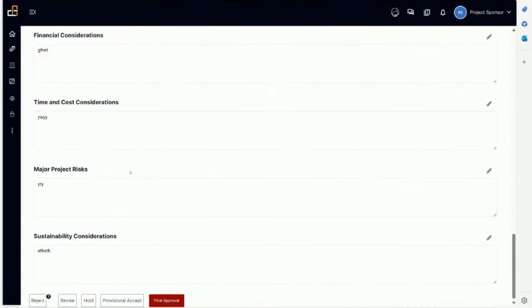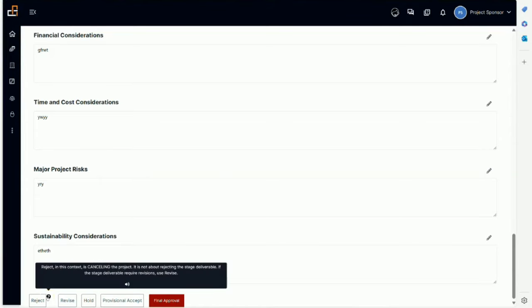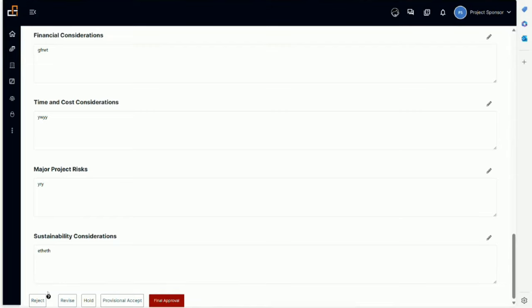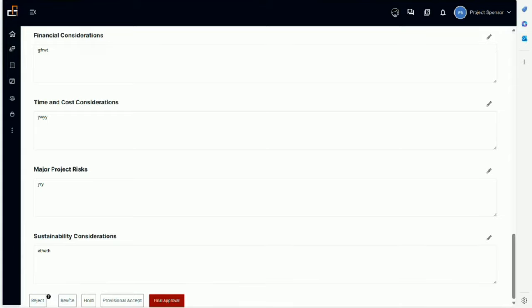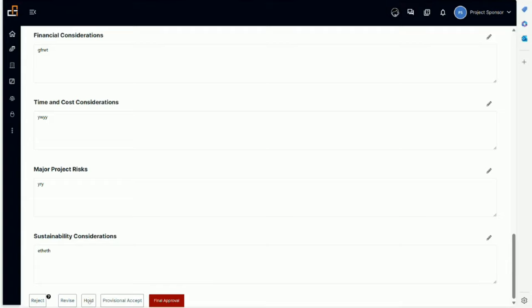We can go through the whole thing, and at the end, decision-making. The sponsor can reject, and reject in this context means cancelling the project. It's not about rejecting the stage deliverable. If the stage deliverable requires revision, use revise. We're telling you there may be some errors here and the sponsor wants them to be revised. They can click on revise and a box will pop up to put comments. That will go back to the project manager. But rejecting means cancelling the project, closing everything, and going into the project closure stage to close the project formally. For some reason, the organization could decide to put the project on hold.